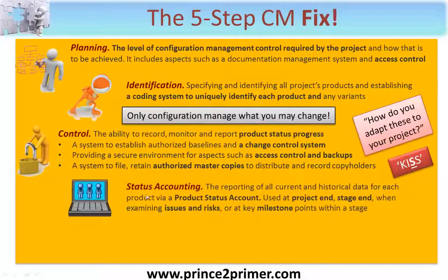Step 4 is status accounting. There's that word again. Don't be put off by this. It's merely the reporting of all current and historical data for each product via a product status account. This is a report. Get used to that. It's simply a report. It would certainly be used at the project end, at the end of each stage, and for example, when examining issues and risks during a stage or at key milestone points.